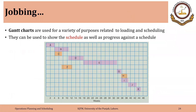Another important element in job shop scheduling — and very important in project management — is the Gantt chart. Gantt charts are used for a variety of purposes related to loading and scheduling, and they can be used to show the schedule as well as progress against the schedule. Time is shown on the horizontal axis, generally at the bottom, and activities are shown as horizontal bars. For example, activity A takes 4 weeks, activity B takes around 7 weeks, and so on.